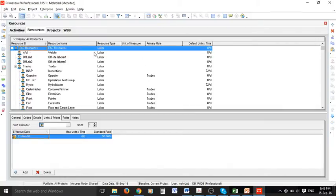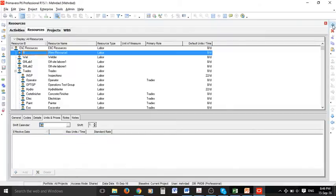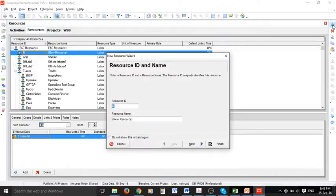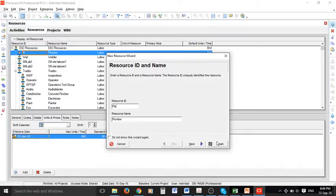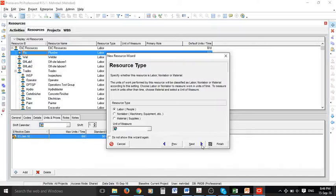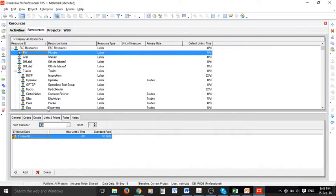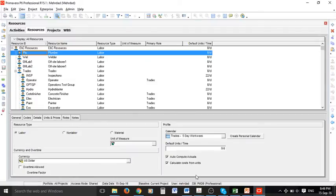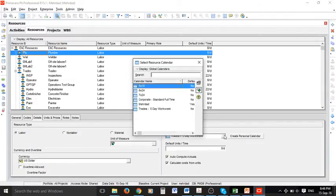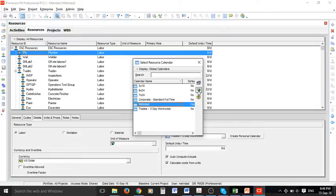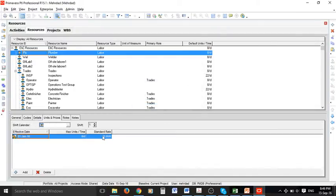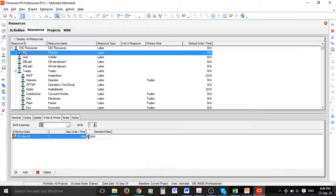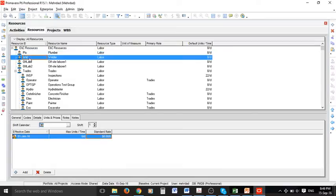And maybe one more resource - we can add for example a plumber and resource ID for this one is also defined so I can go to different tabs and change whatever I want. So in units and prices you can change the standard rate for example for this one. Let's pay this plumber $45 per hour and that's done.